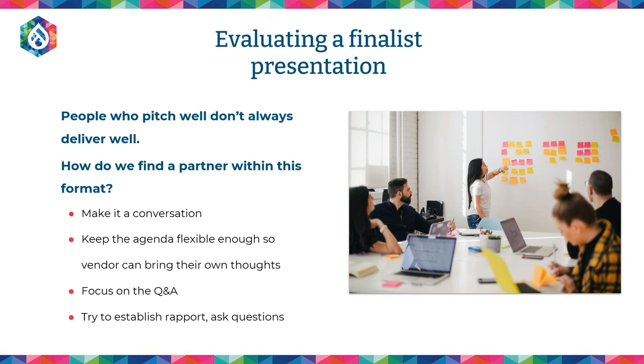The other element of evaluating the finalist presentation is making it as much about Q&A as possible. Often the presentation is not that revealing, but the Q&A is very revealing. So if you weight the time of the presentation more toward the Q&A, you'll often get a lot more value out of it.